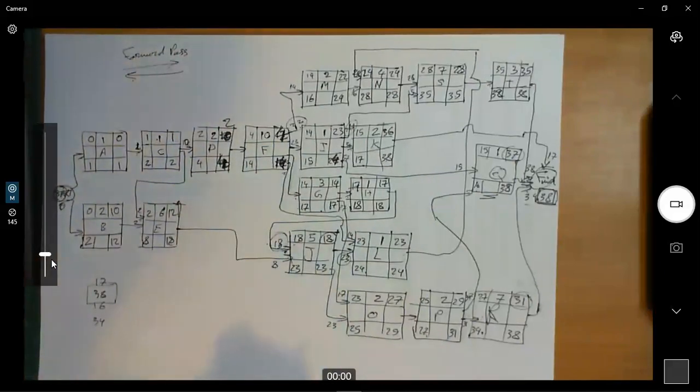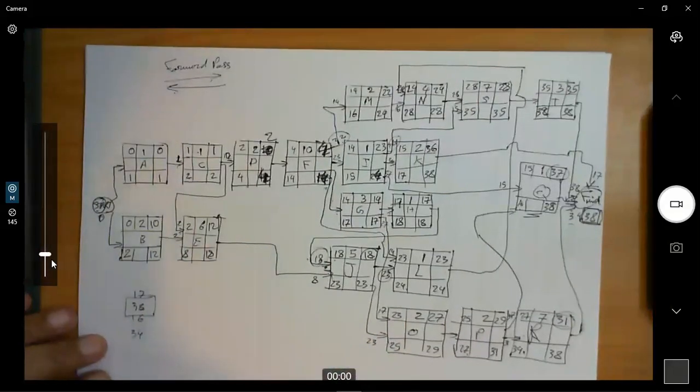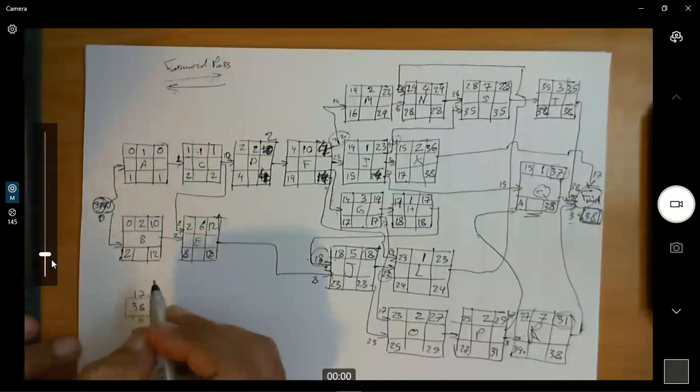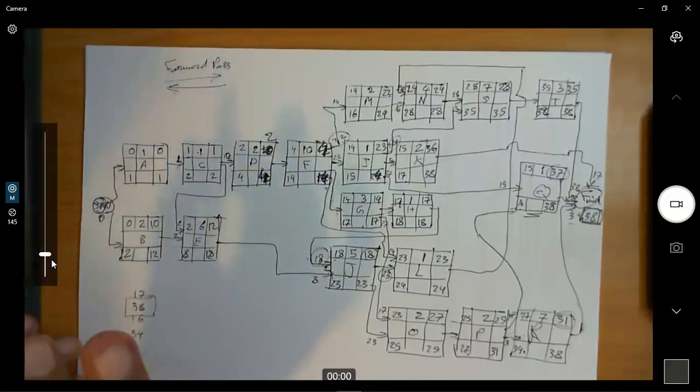Okay, we are done. Now we need to identify the critical path that we have here. First of all, how can we identify the critical activities? Let's first calculate the floating time, the difference between them, for each activity.